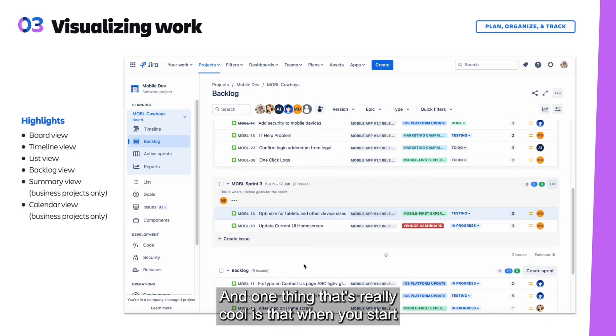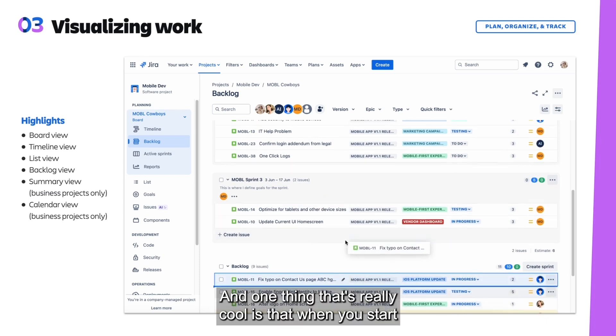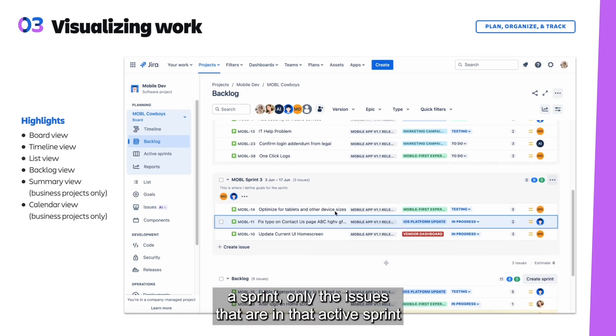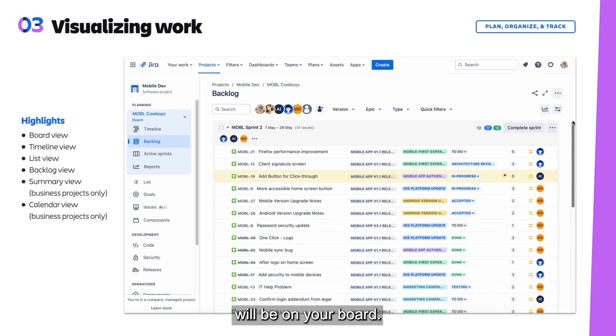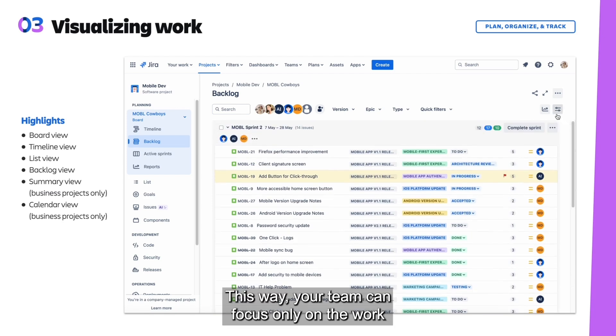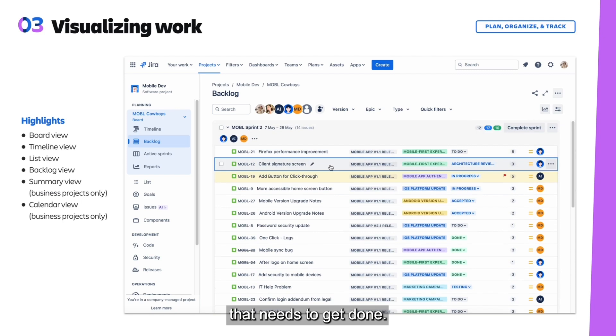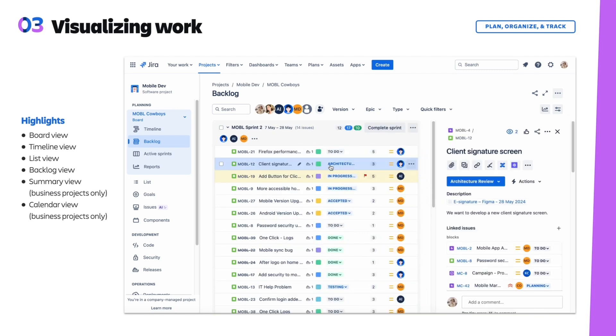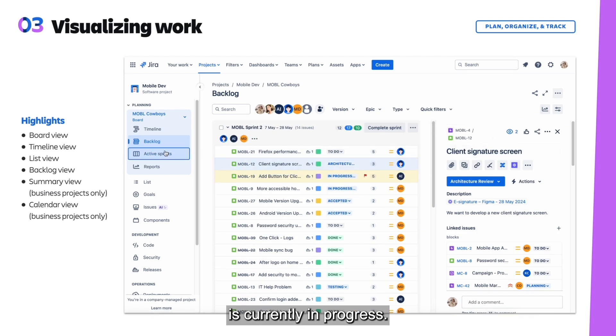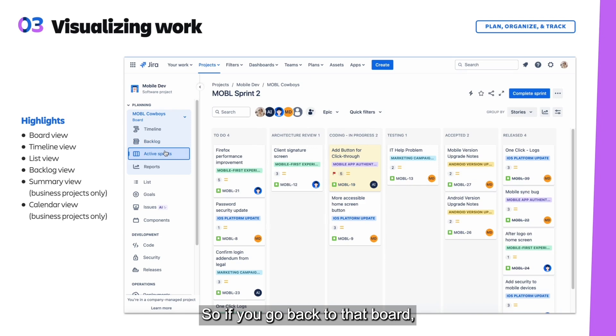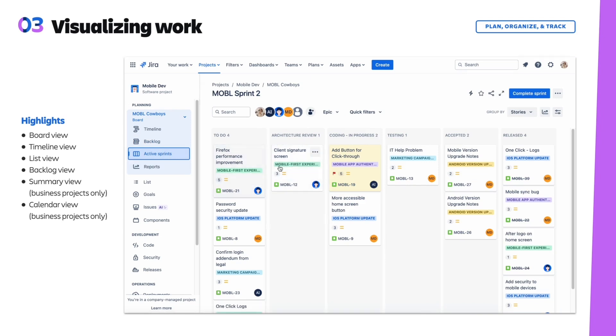One thing that's really cool is that when you start a sprint, only the issues that are in that active sprint will be on your board. This way your team can focus only on the work that needs to get done. We can see here that mobile sprint 2 is currently in progress, so if you go back to that board, you'll be able to see that is also on your board.